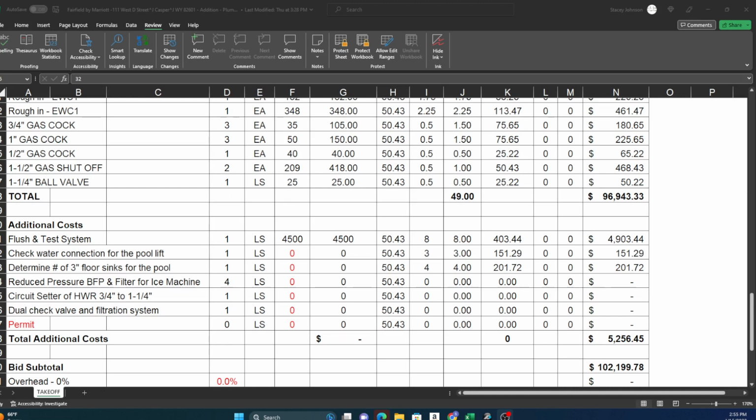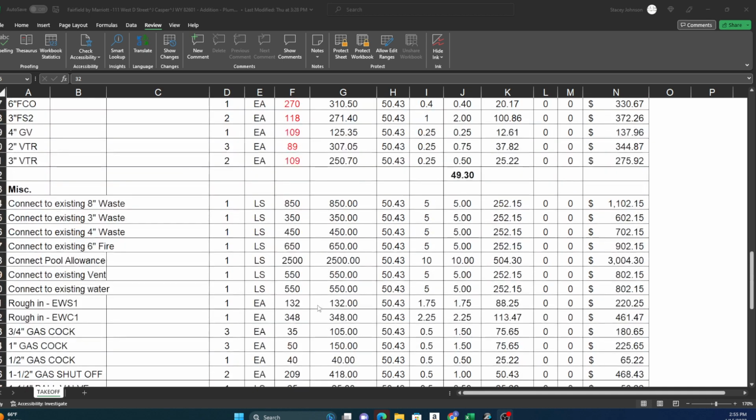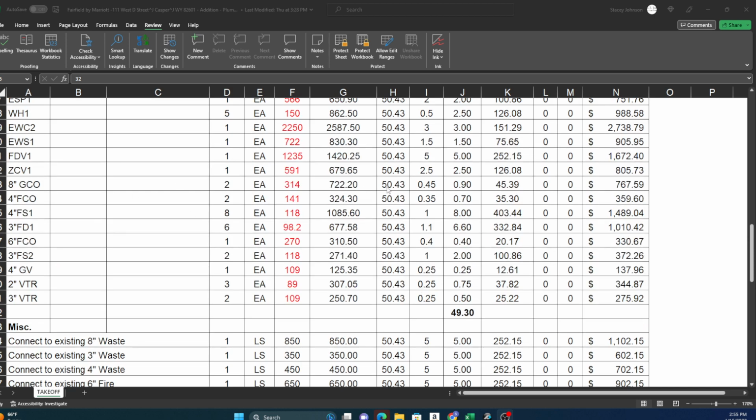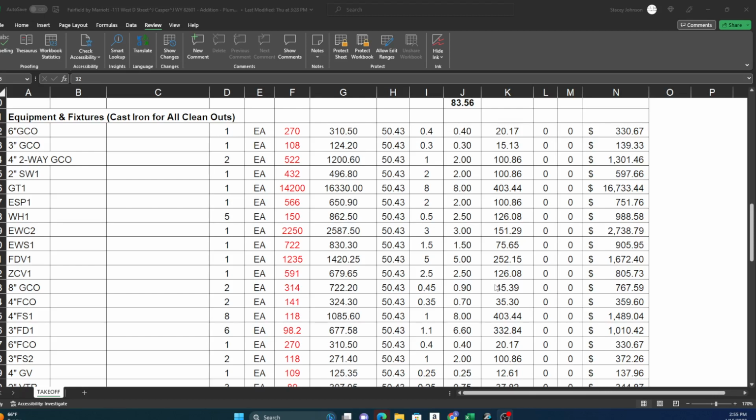The key to it is always to have a very detailed estimate, line item by line item. So it serves you in a lot of ways. This way, you're not cheating yourself in terms of hours that the job will take, because all these numbers we get from our cost book, which, if you're a student, you get for life for free. That comes from the cost book, which is the industry standard for how long the construction industry says it takes to do something. So that's good enough to make sure you're not cheating yourself and you're not overcharging.